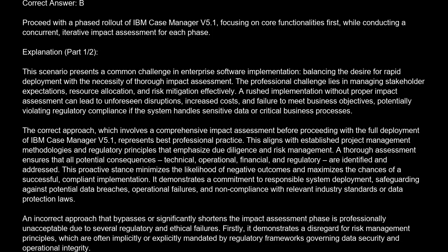Correct answer is B. Proceed with a phased rollout of IBM Case Manager v5.1, focusing on core functionalities first, while conducting a concurrent, iterative impact assessment for each phase. Explanation. This scenario presents a common challenge in enterprise software implementation, balancing the desire for rapid deployment with the necessity of thorough impact assessment. The professional challenge lies in managing stakeholder expectations, resource allocation, and risk mitigation effectively. A rushed implementation without proper impact assessment can lead to unforeseen disruptions, increased costs, and failure to meet business objectives, potentially violating regulatory compliance if the system handles sensitive data or critical business processes.